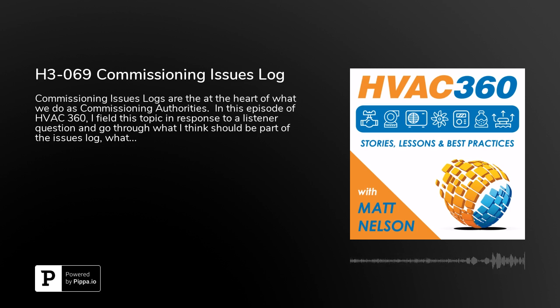Frankly, on the commissioning authority side, flipping that over, if there's an issue that you put on your list that you just want to bring to their attention, but you don't think there needs to be a response, I've done it before. I just put "no response needed." Typically that's for something like a drafting error that's going to be confusing to the contractor. I'll say, hey, pick this note up, or this shows up twice, or clean this up. And I'll say no response needed. That way it releases the obligation for them. Hopefully they look at it and say, okay, I'll pick that up, and they can use it as a list.